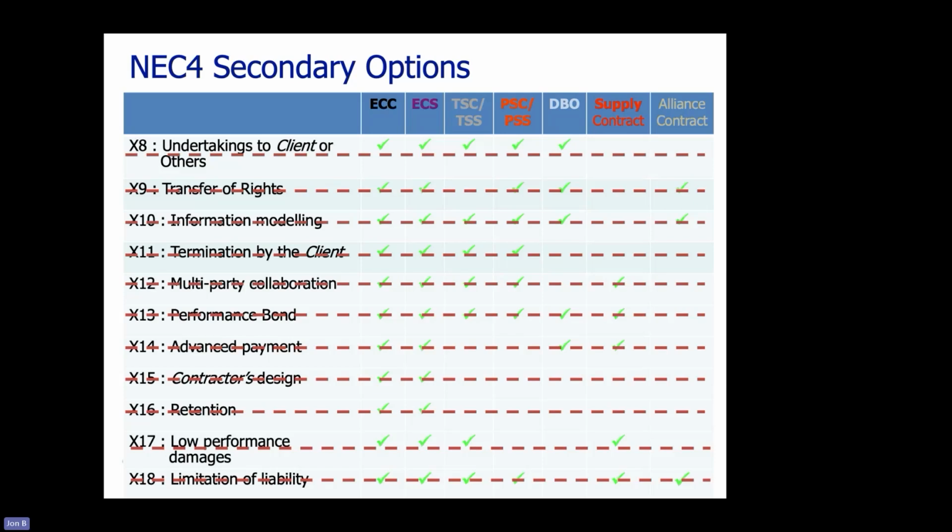If that's the case, the procedure is the contractor stops work immediately, and the amount due is the contractor gets paid for the work that they've done so far, and costs committed, but minus the forecast costs of getting someone else in to finish off the works. And if the contractor's bust and can't pay it, then that's where the performance bond or parent company guarantee comes in. But is that classed as termination by the client? That would be termination by the client, yeah.